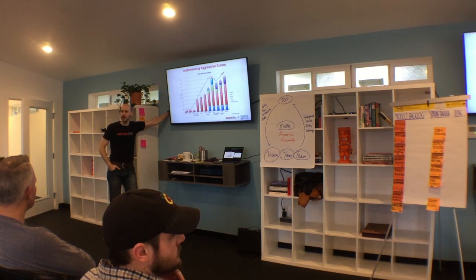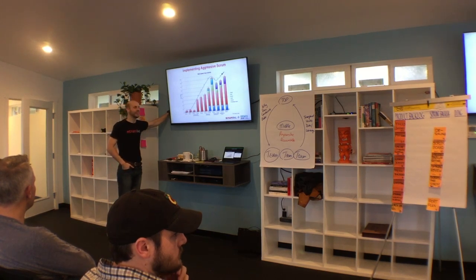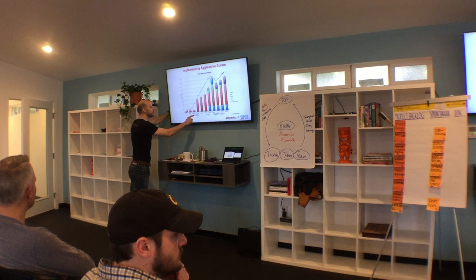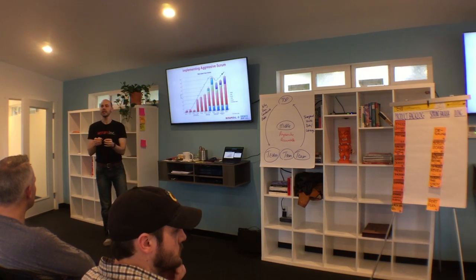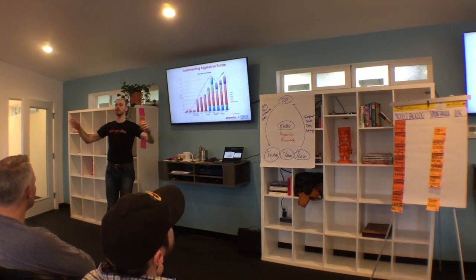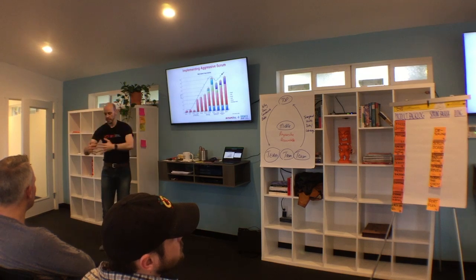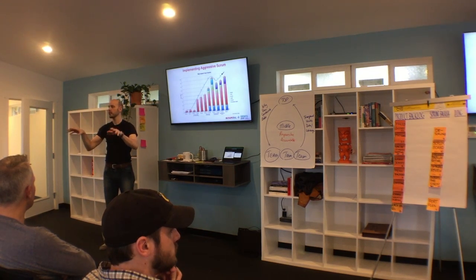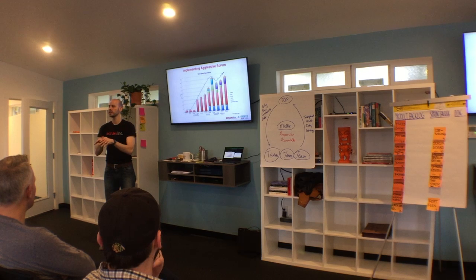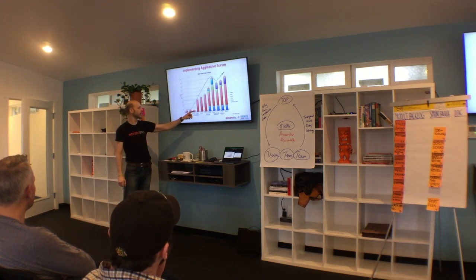So we asked the Scrum Master, what did they do? What happened? And here's what they wrote. They said the team became stable. Before, teams were being lent out for different special projects. Here, they were one team working on one backlog, sitting at a table this size, this close or closer together all day, every day. That's all they changed.